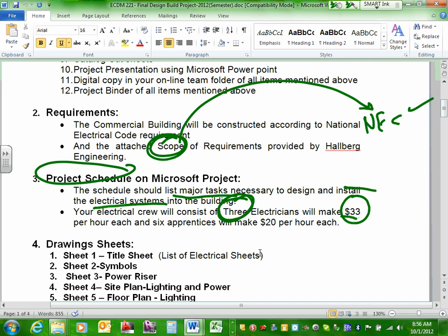And we're going to have 6 apprentices that are going to be working with those guys for the ratio of 2 to 1, right? 2 apprentices to 1 journeyman. Those are the who cares. Now we're starting to talk to the contractors. This is your manpower, your people power. They're going to be building this project.